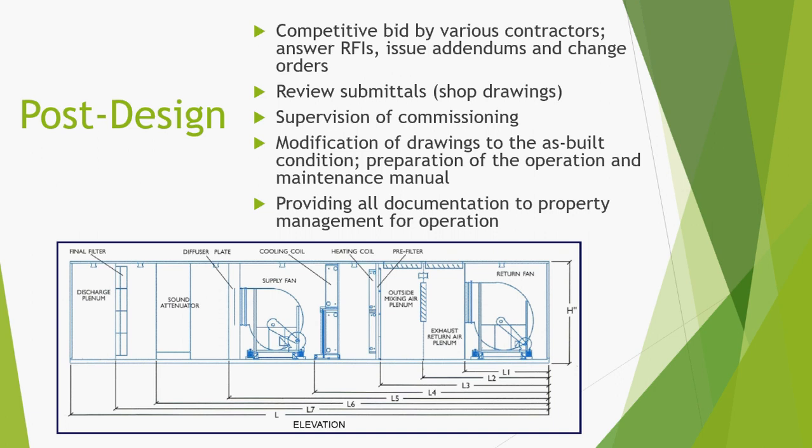During construction, the engineer may be required to supervise installation and/or commissioning services. The final responsibility of the engineer is to modify the drawings to as-built condition, prepare O&M manuals, and provide all documentation to the owner for their records. So this was a basic overview.